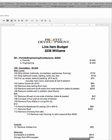I hope this has been informative. This is how we go back in, refine the budget after we have demoed so that we know exactly where the money's going and what we need to do to finish a project. But like I said, we usually don't know until after demolition where exactly we're at. And then we have to move money around a little bit if we have a little bit in contingency, or as you can see, we are buffered in on that chimney. We were buffered in about $1,100, so we just spread it around a little more evenly. Hope this has been informative, and we'll see you on the next one.